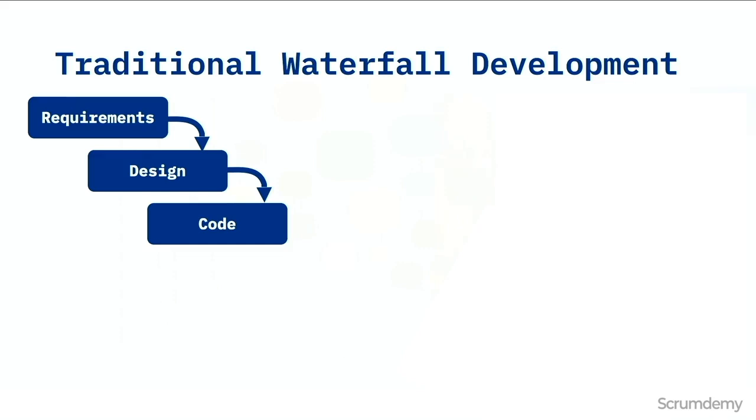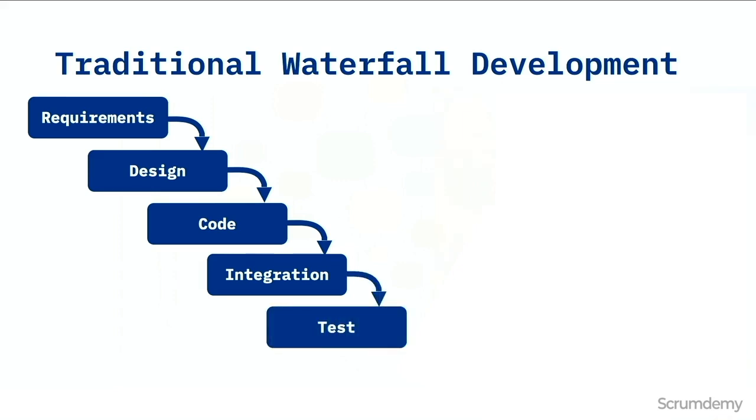Then after coding, we finally get to integrate. So all along we're coding in isolation. We're not integrating my module with the next person's module. There's a time when all those modules come together, the first time we realize, do all these pieces of code even work together? And then we move on to the testing phase, because now we've got a system that people can test, and as they find bugs, you've got to go back, swim up the waterfall and open some bugs in the coding phase and do some recoding.